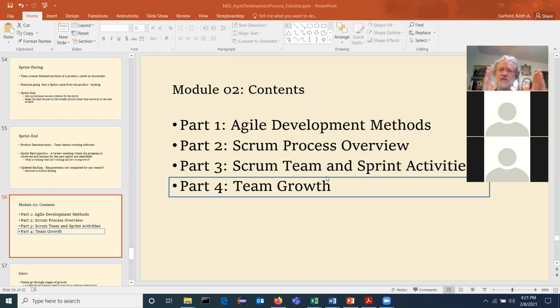Same thing with the meetings. If you schedule a 2-hour meeting, it's a 2-hour meeting. And if you didn't get the work done in there because people were talking about other stuff, that's a team problem. Saying that we have to end at this time really focuses your attention. It's very helpful. Previous software paradigms, if the work wasn't done, they just kept extending the time and extending the time and extending the time, which also extended the cost. And Agile says, no, when you're done, you're done. And the product that you got is the product that you got.